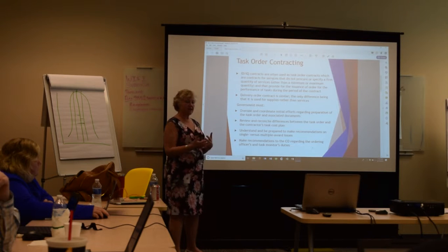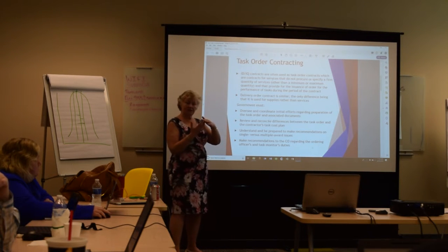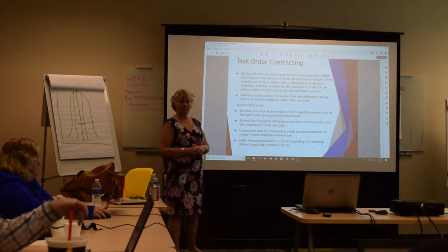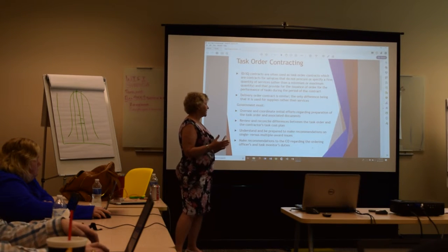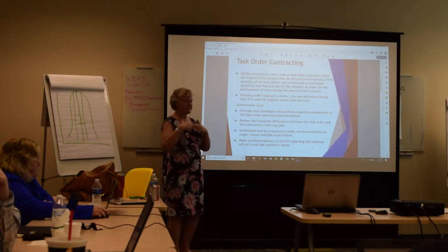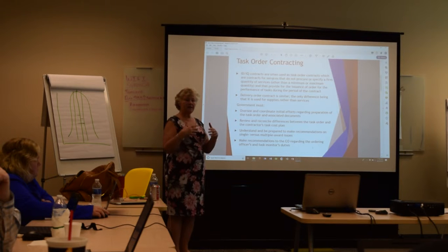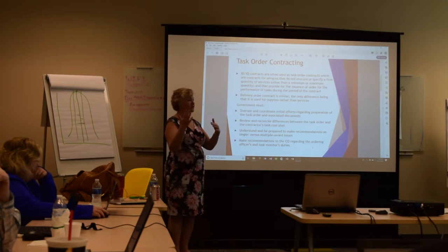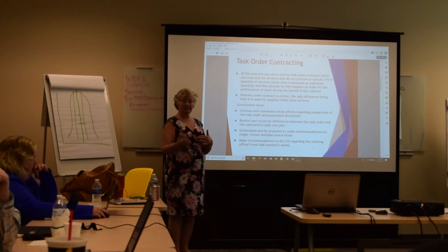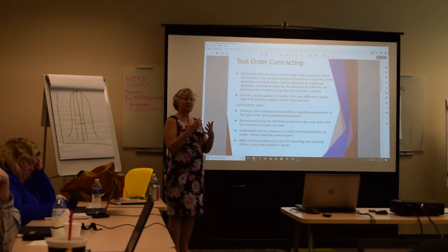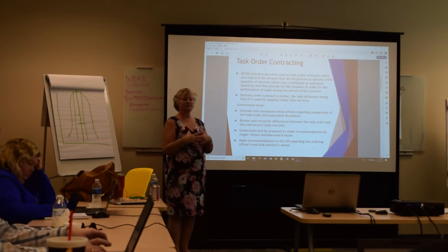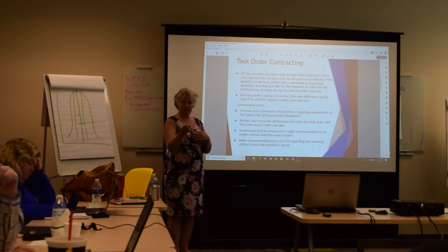Are there any associated documents? So in the case of a task order, they would have to give you a description of the project they want you to work on. Once they send that to you, you send back a task order proposal, and they do a quick check to verify that all the labor categories and prices you put match the contract, that you're using the same labor categories and the same rates for the correct year. Just like we talked about, you have to be using things that are on the contract baseline. So it applies to you, it applies to them.